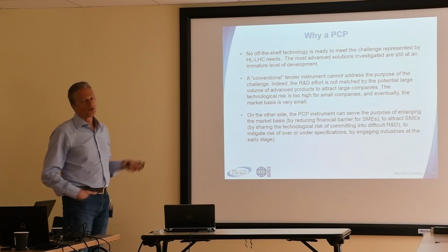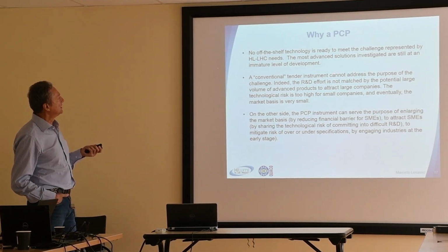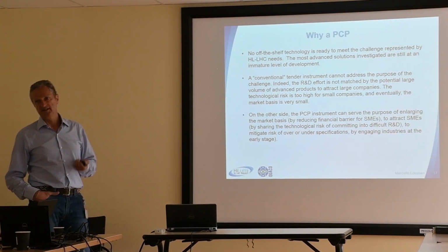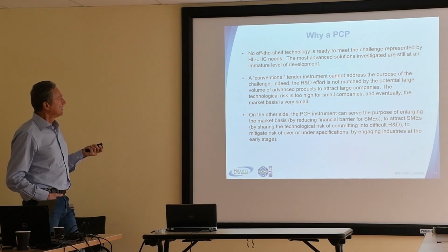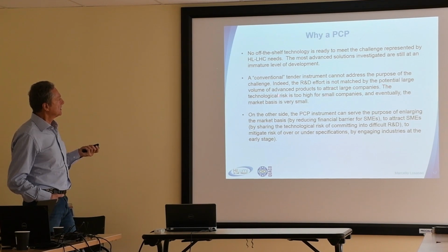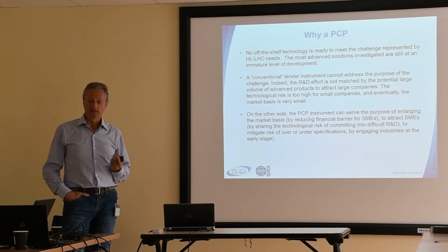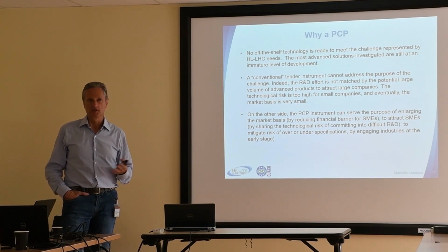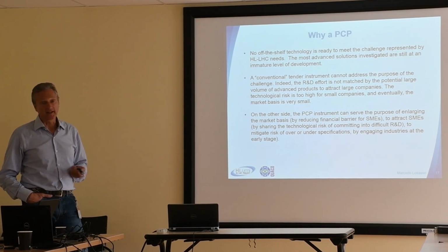Now, why should you go for a PCP? You should go for a PCP if in the market there are not already available solutions for what you are looking for. Also, considering that it's R&D, and R&D is not 100% success oriented, you know that R&D can fail.